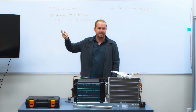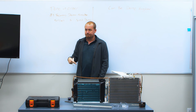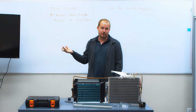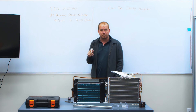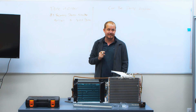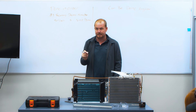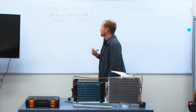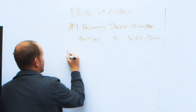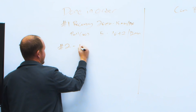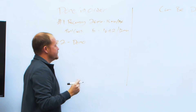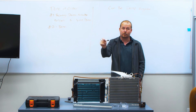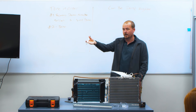It also depends on why the system is being replaced — if it's already low on charge, there's probably not much in it. But the key point is: if saving five minutes early in the critical path can save a lot of time towards the end because everything is in order. After recovery, the next step is demo in general. Once you're past the recovery phase, you can demo asynchronously — though is there an order that's better?